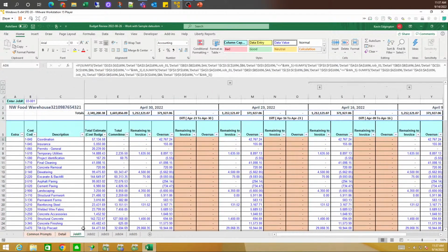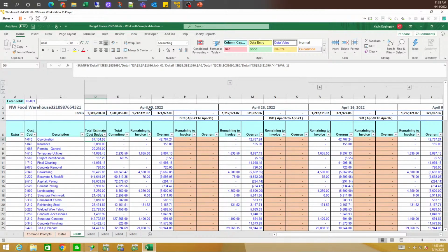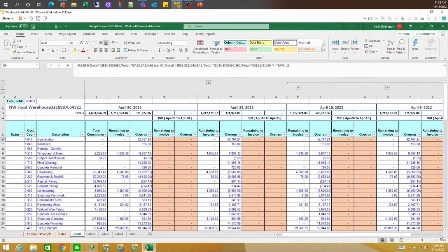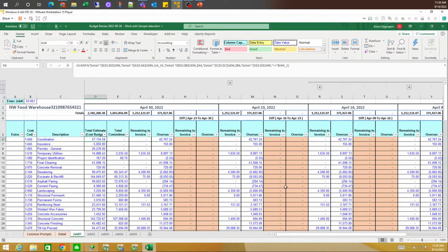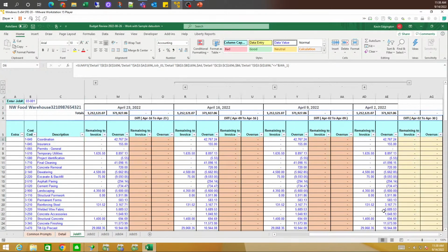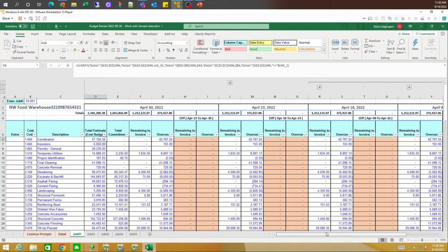If I take a look at one of the jobs, it shows all the different cost codes. One of the things kind of cool about this is they wanted to see the progress of things. So this is where it was at this particular date, there's where it was at that date, that week. Week by week, it shows multiple weeks of where it was at in that point to see the trend of where things are heading on the job. Then they've got one that pulls it together for the whole month or whole period of time and where the balances are at and so forth.